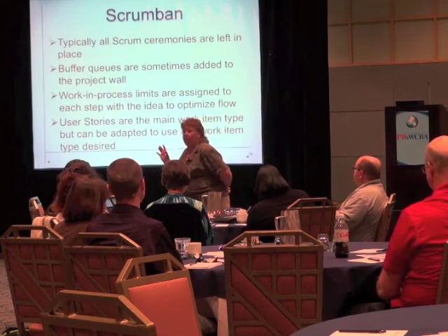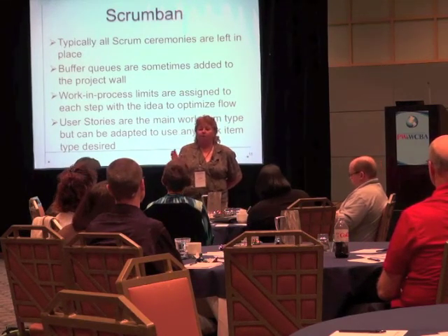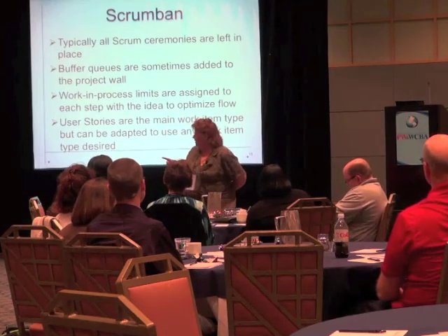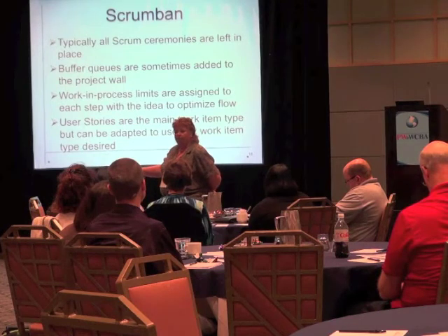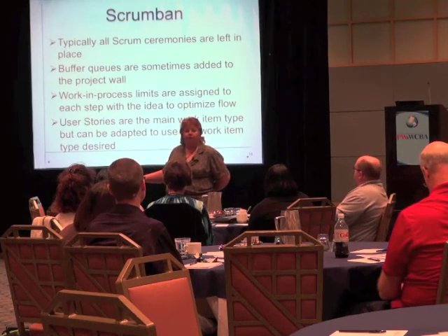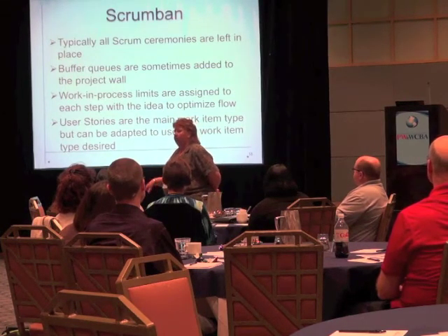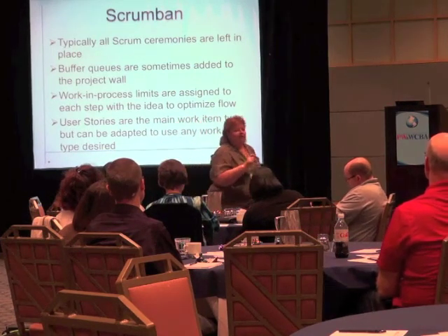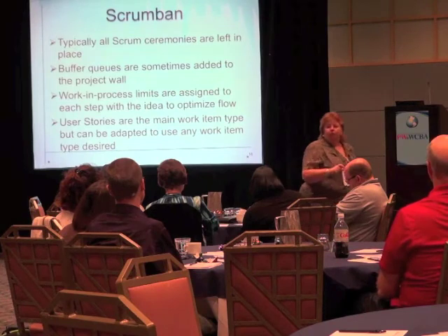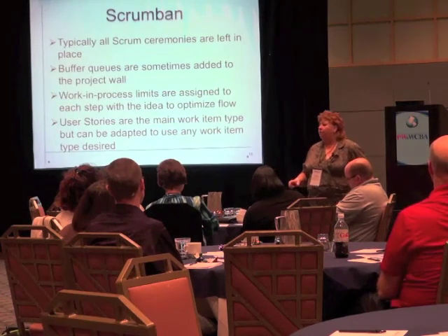Scrumban pretty much is simply applying the work in process queues. And I'm going to get to an example unless you want me to stop here around anything. In Scrum, typically you're using user stories, and that's your unit of work, right? And just so you know, even when I'm doing user stories in Scrum and I break down into tasks, I don't set up the board by tasks, I set it up by story.